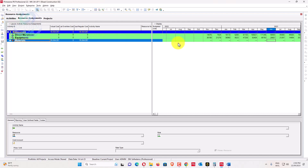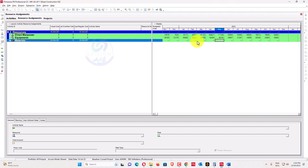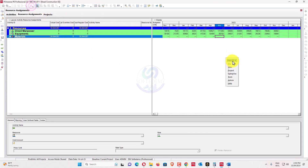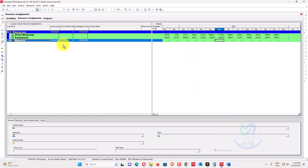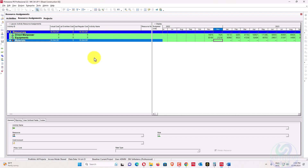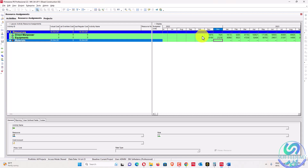There are also problems with resource assignments in an updated schedule. If no baseline has been assigned, the client may ask for a planned S-curve or a planned versus actual comparison. But in your updated schedule you have no planned values, so you cannot make a meaningful comparison between baseline and actuals. If you assign the baseline after the fact, the plan values will still not match. This is the case we will resolve.